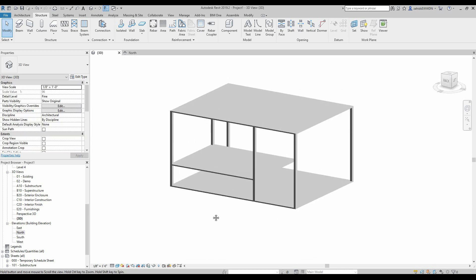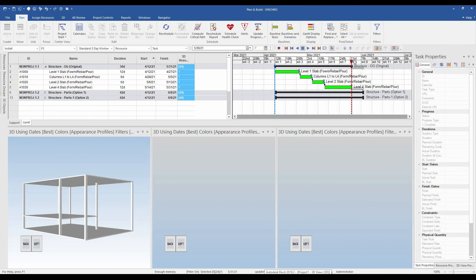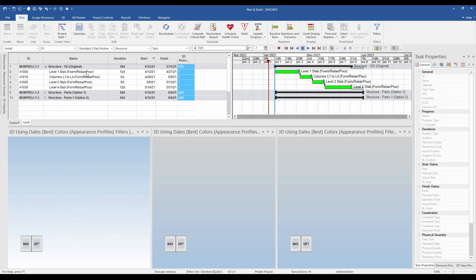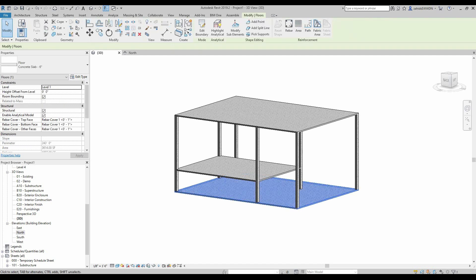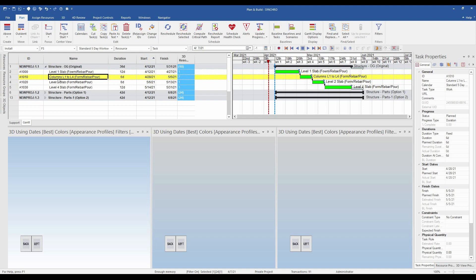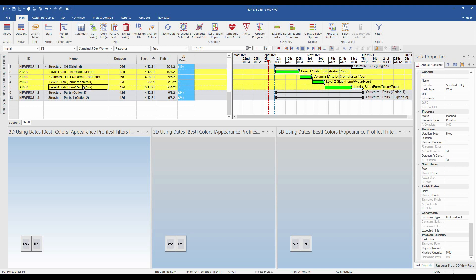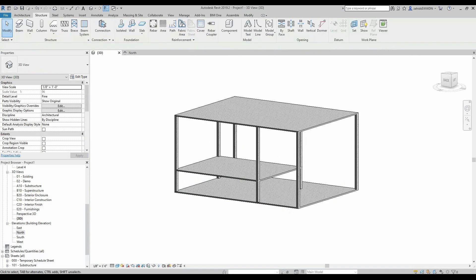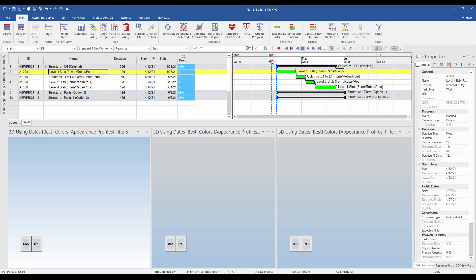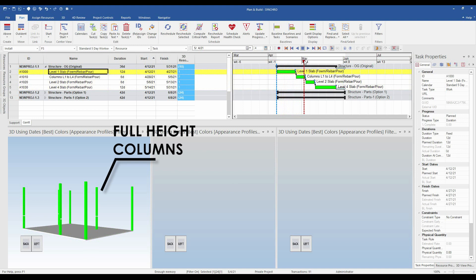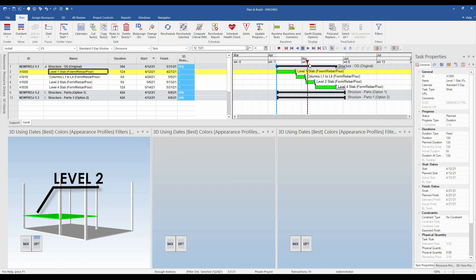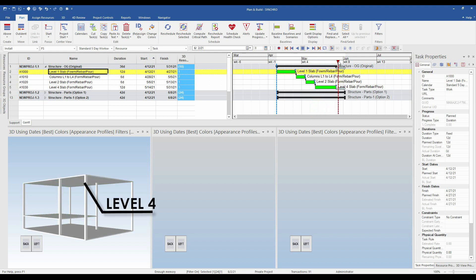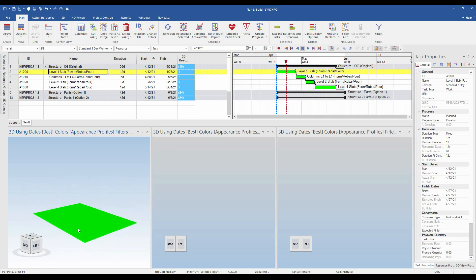I have Synchro open on my screen. If you look at the activities, this is how it looks: we have level one slab, then columns going from level one to level four, then the level two slab, and the level four slab. Pretty simple — just four activities representing the construction of this entire small structure. If we play a simulation of the construction sequence, we see the level one slab constructed, then columns cast, then the level two slab, and finally the level four slab.